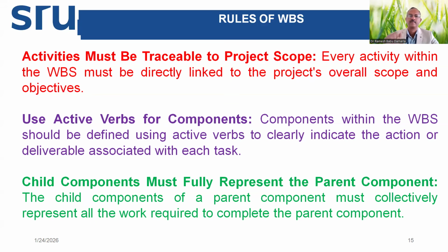Suppose 2 steel rods are to be fitted near the engine of the car. Now, if we write just the steel rods, a particular team member will not understand what to do with the steel rods. Writing welding of the rods gives the clarity, by adding an active verb.